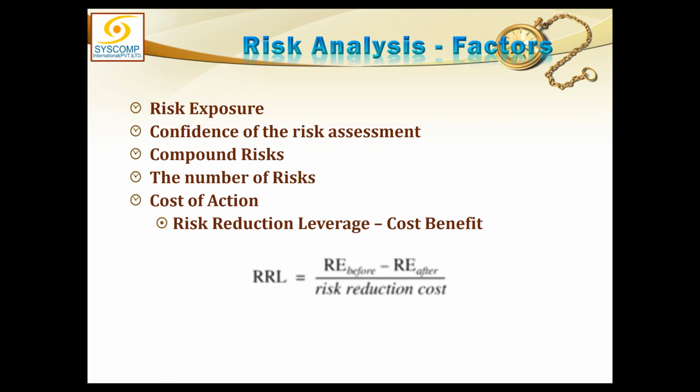We can spend 150,000 to gain a benefit of only 90,000. That is perfectly all right. Why? Because when we were calculating the actual cost of the risk, we did not take into account the human life loss. So if we could add that into it, then the loss is not going to be just 10 lakh rupees. It is going to be much more than that.